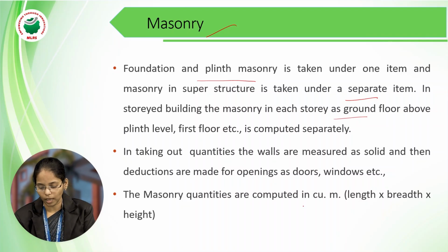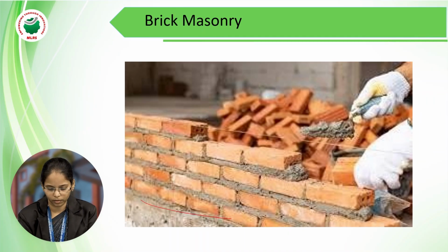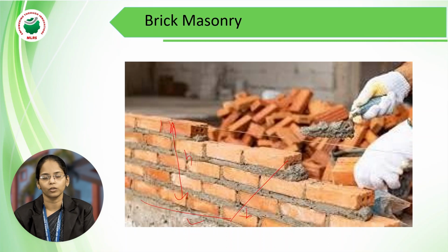So the quantities are measured and computed in cubic meters: length, breadth, and height. So this is the brick masonry length, and here breadth, and next this is the height. So L, B, H, everything. So for brick masonry, we need to calculate in cubic meters.